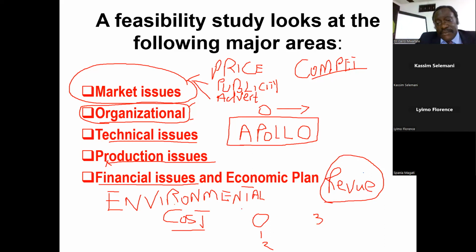And with this, of course, let me come back to this cost. When I say year 0, for bigger projects, this is the year where you will need to have a grace period. So during the grace period, year 0, mainly construction dominates for the projects. This is before you start yielding your benefits. So you must be smart, and you are responsible for identifying all these costs that are happening at year 0. It's very important you know early as much as you can.